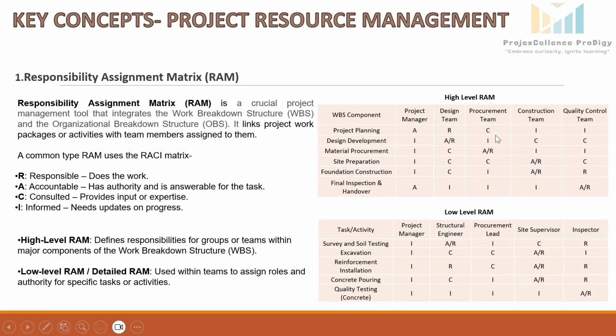High level RAM defines responsibilities at the team level. The detailed RAM or low level RAM goes deeper to assign specific individuals within teams to particular tasks. For example, we can take a WBS component, let's suppose the foundation construction, and we split it into the tasks and detailed activities. So we can draw the low level RAM or detailed RAM for this WBS component.